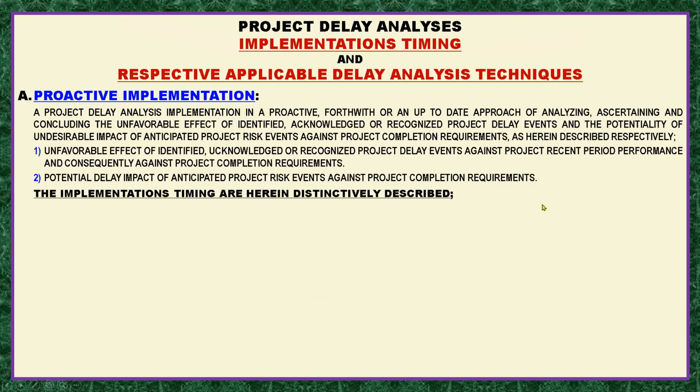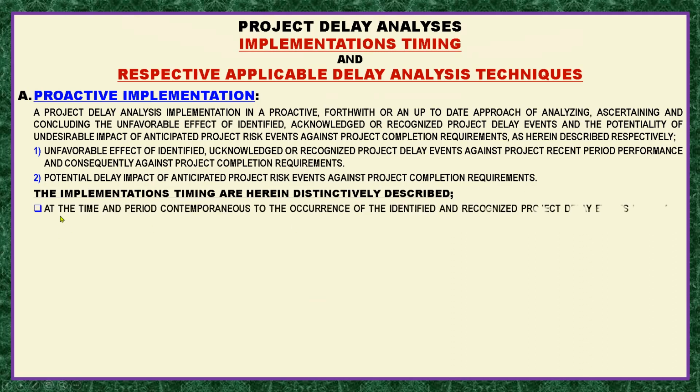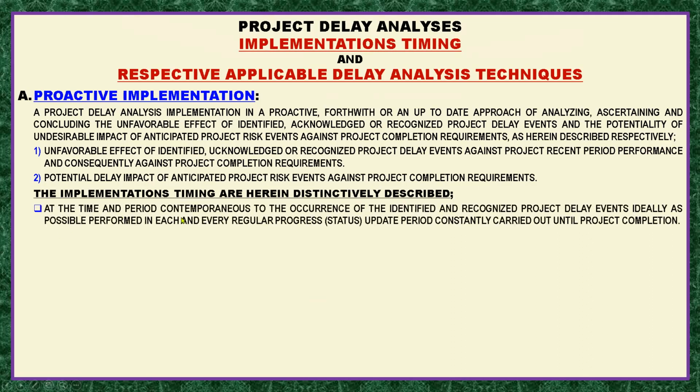Okay, we have here the implementation timings, which are herein distinctively described. First, at the time and period contemporaneous to the occurrence of the identified and recognized project delay events, ideally performed in each and every regular progress or status update period, constantly carried out until project completion.